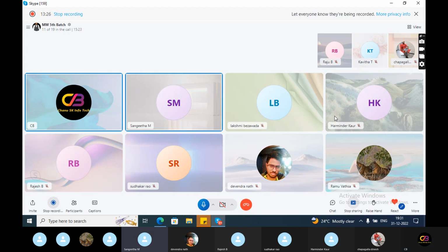So next comes the realize phase. Usually it takes 4 to 5 months. All configuration and testing we do here, like custom codes. The Scrum Master will review the configuration and inform the users in weekly meetings. The Scrum Master will also give training and explanation to users. In this phase, user participation is high, and users will have access to the Sandbox.